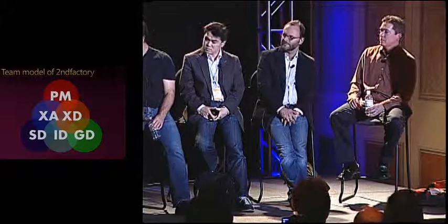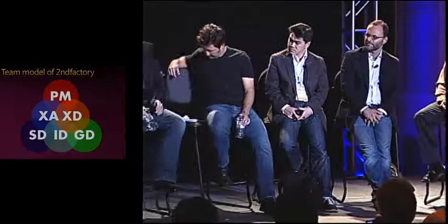You brought up data. That's another interesting point. That's a great place to figure out your data model. Not just your model, but also your data plan for the build phase of the app. Because a lot of times you're not building against live data, so you need dummy data, and a lot of times we'll come out of that having better answers to that question.